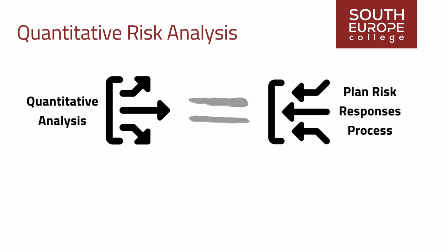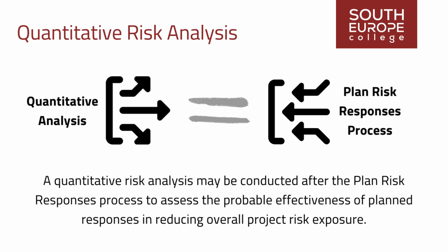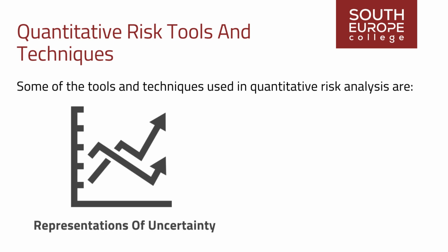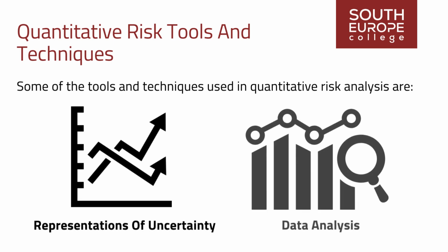Additionally, a quantitative risk analysis may be conducted after the plan risk responses process to assess the probable effectiveness of planned responses in reducing overall project risk exposure. Some of the tools and techniques used in quantitative risk analysis are representations of uncertainty and data analysis.